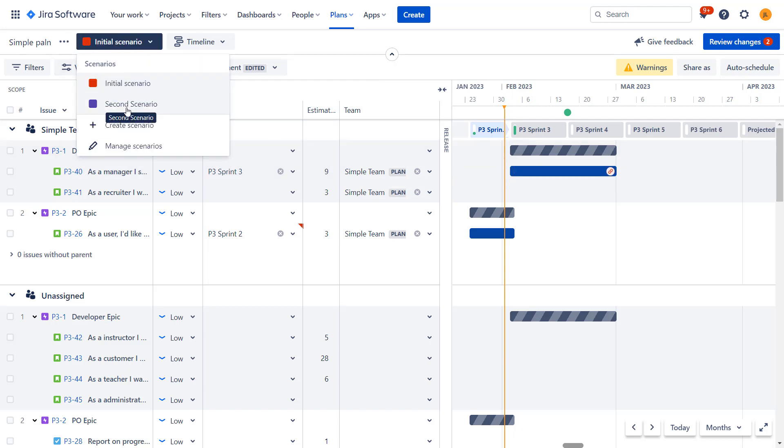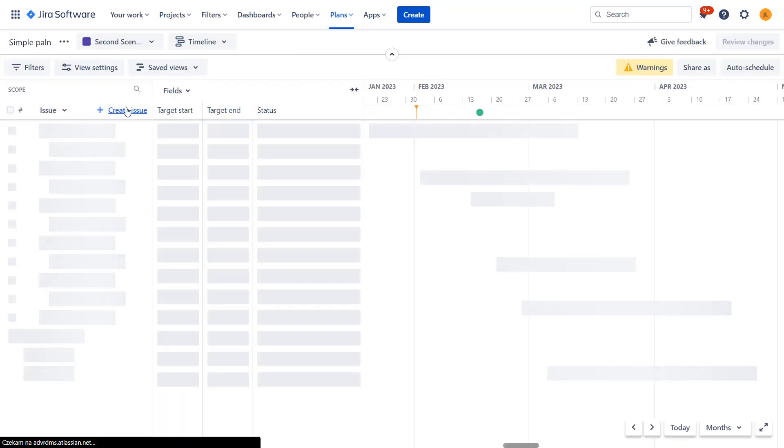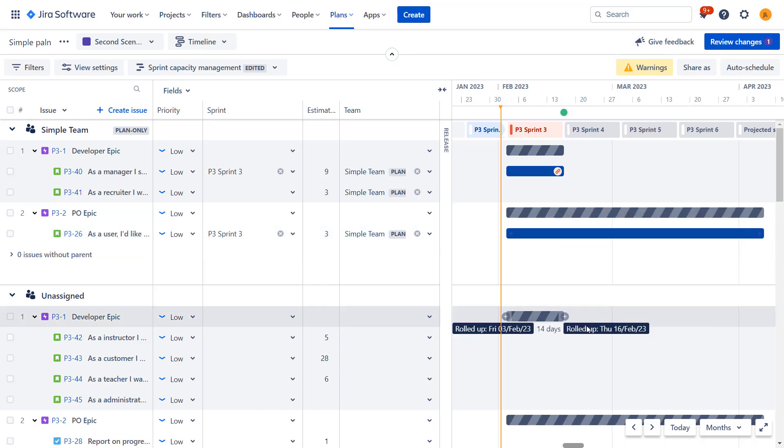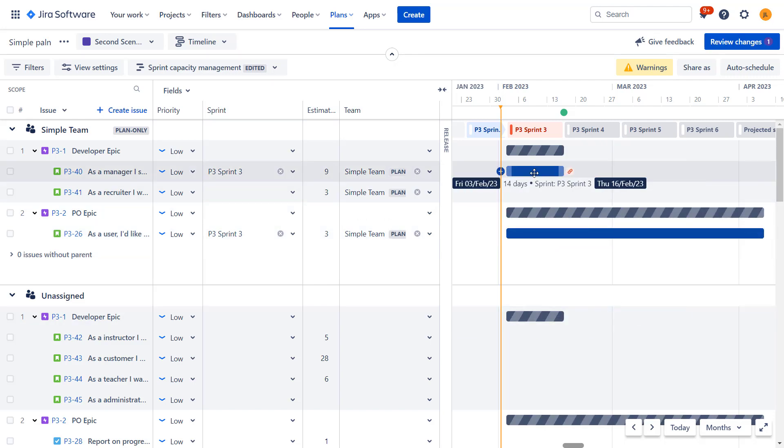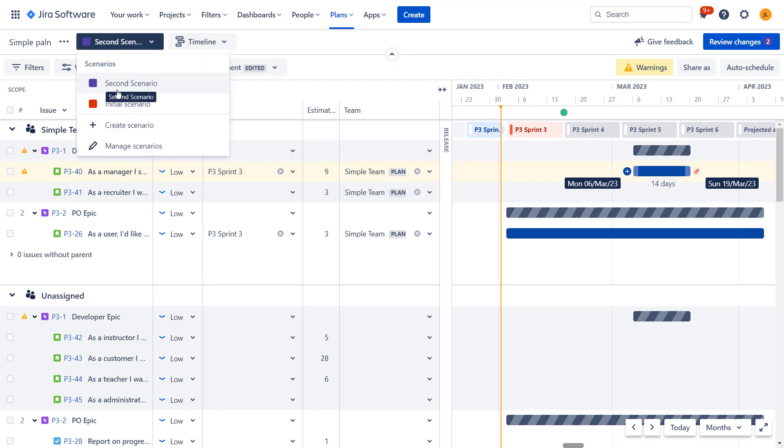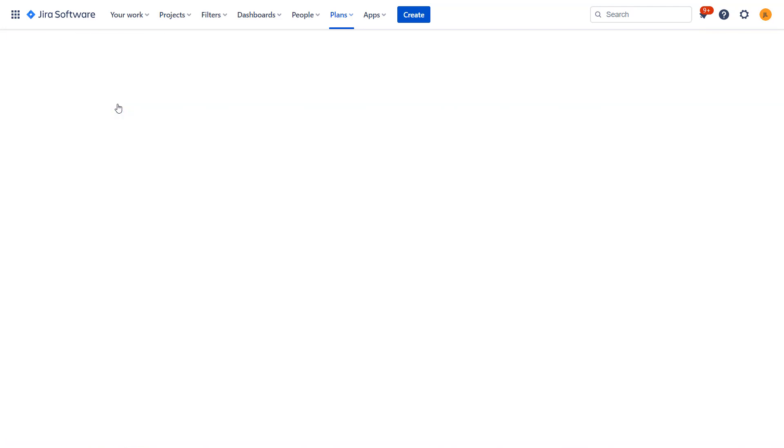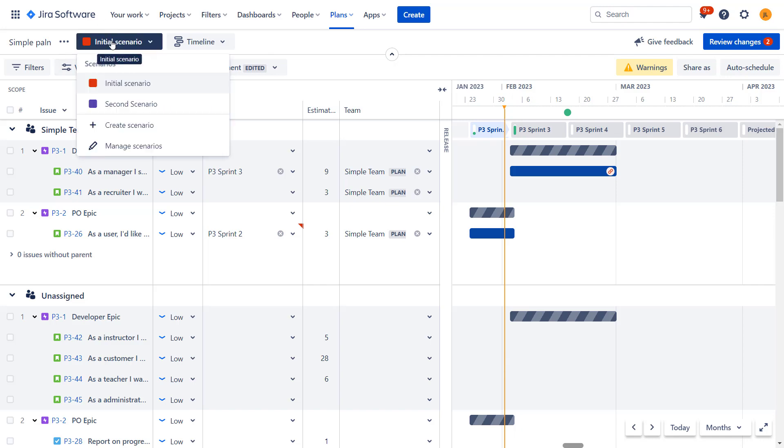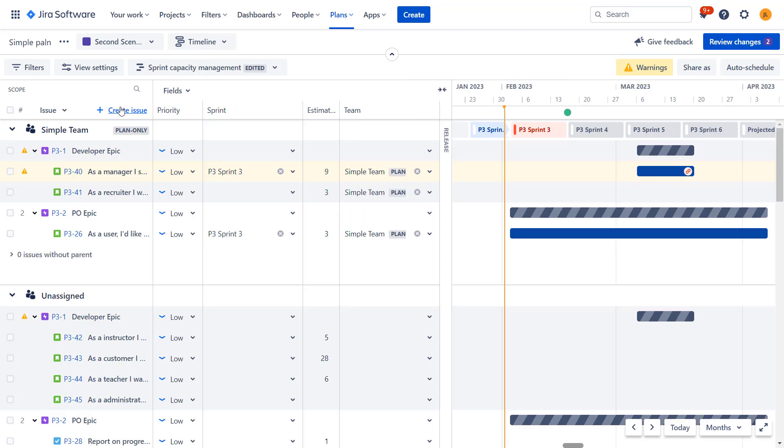Then I will switch to second scenario and these changes won't be applied. I could actually do some other changes. So let's move this one, make this longer and I will get back to initial scenario. You will see that the changes I did in initial scenario are here. So now we have two plans in parallel, right? So you can have multiple different scenarios, do different changes on them on the plan and see what works best for you.